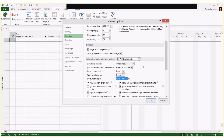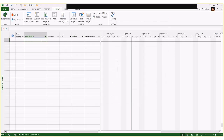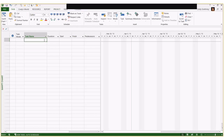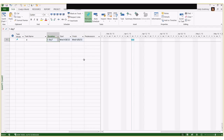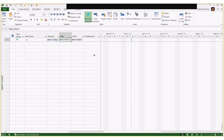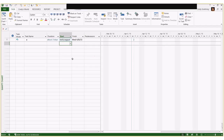Let's come back to the business of auto-scheduled versus manually-scheduled tasks. In 2010 Microsoft added the manually scheduled task feature, added primarily for people used to scheduling in Excel who expected Project to act more like Excel. If you make a task manually scheduled, it does act a bit more like Excel. On the task ribbon I'll make this task manually scheduled — the bar changes, you get the icon in the task mode column, and you can enter text like 'about three days' or 'early August' into the fields.